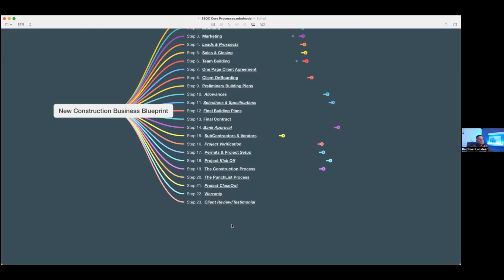And then once the punch list is done and satisfied, we meet with the owners, video record, going through the punch list, documenting it, verifying everything's done. The homeowner signs off on it, and boom, punch list done. They move in. They're living in their home, and the GFI outlet trips or something stops working. A lot of that happens quite often, you've got a GFI that's tripped, something doesn't work.